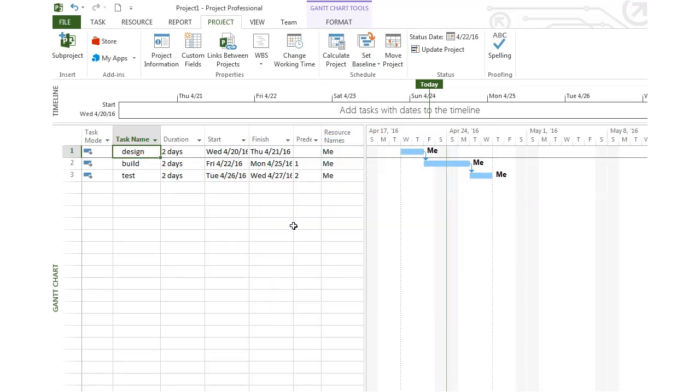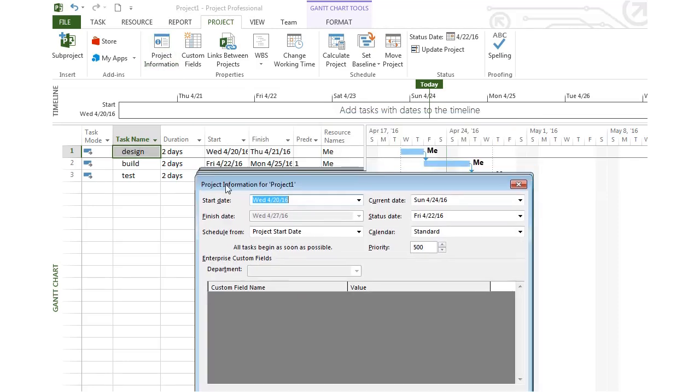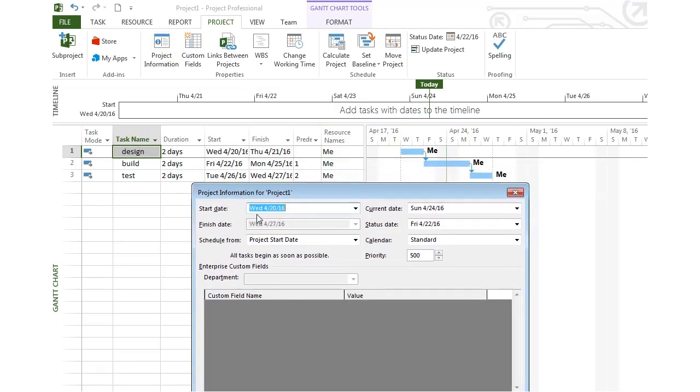So I set this baseline for the entire project. If I look under Project Information, we can see the start date for the project is April 20th, the finish date is the 27th, and the current date is self-explanatory.